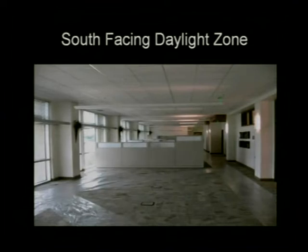One thing that I want to touch on this particular slide that is an important lesson learned is we probably wouldn't do again, and that is to utilize our daylighting fixtures with our emergency lighting. As you can see, as you go down through, there are select fixtures that are on, and those are on 100% of the time because they are for emergency purposes, as required by life safety codes. What we would probably do in the future is look at utilizing integral emergency lighting units separate from the light fixtures. I think it has a tendency to create a perception that something's wrong with this lighting system, and that's an important lesson that we learned and will probably do different in the future.